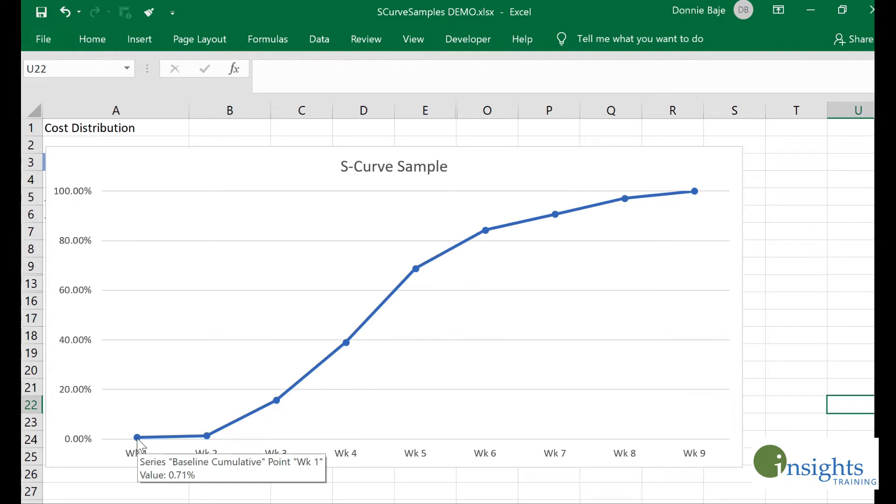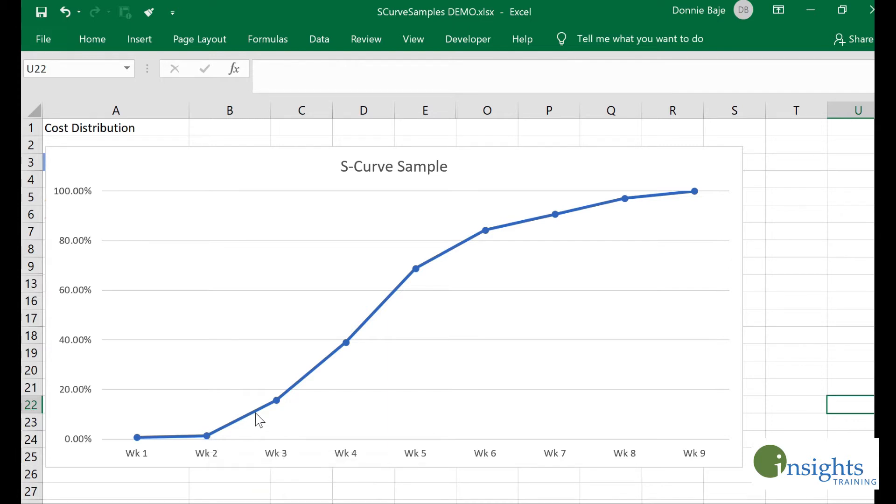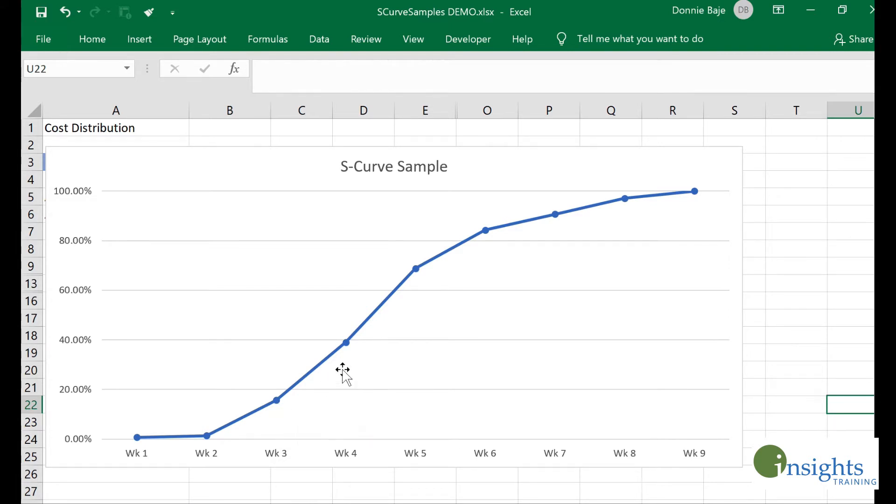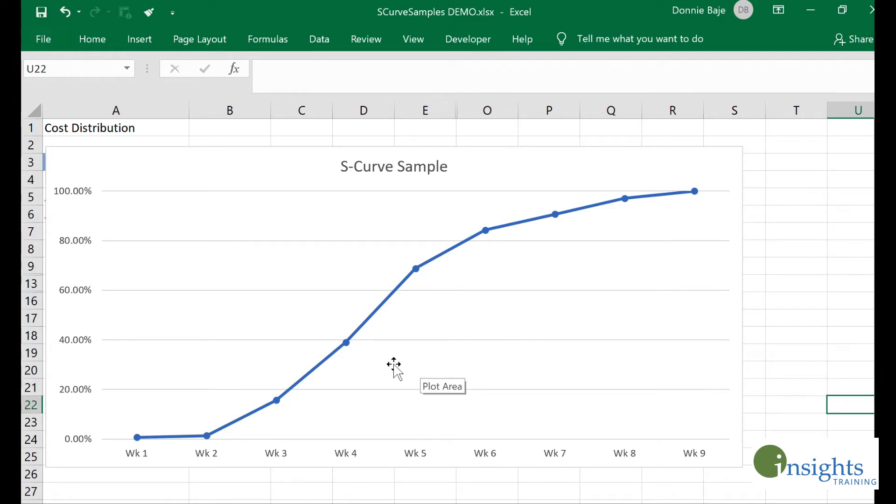As we go along throughout the duration of the project, the cost is being utilized. By week two, 1.43 percent of the budget is now being used. Week three, it's already going up to around 15.71 percent, and so on.